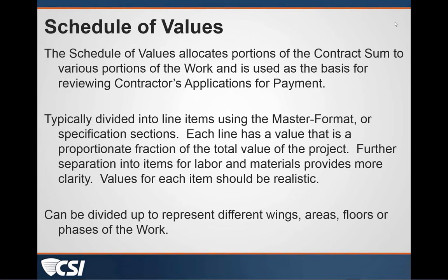The fact that he's saying that seems to indicate that there are some of us that aren't either passing the information along, getting the feedback from the consultants, or aren't even looking at the schedule of values ourselves once we get them. I know I would never allow a line item to say electrical and not have it broken down into the parts and pieces, or HVAC or plumbing. And I do oftentimes see that on the first pass through on the schedule of values, the contractor will say, well, it's all one contract to one guy. That may be the case, but you still have to break it down so we can make these evaluations when we're certifying these pay apps.